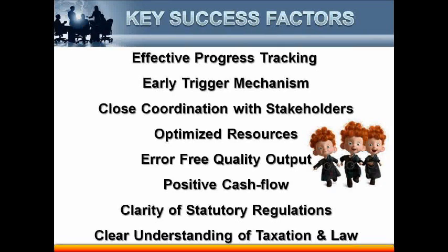The area of focus is that instead of having a curative approach in case of an overrun or a slippage, we are talking of a preventive approach. Now that's an early trigger mechanism. We have various tools which we use for having an early trigger mechanism. We have a 15-day look ahead, for example. We have a 30-day look ahead depending on the schedule, depending on how we are progressing. We also have maybe a 24 hours look ahead.